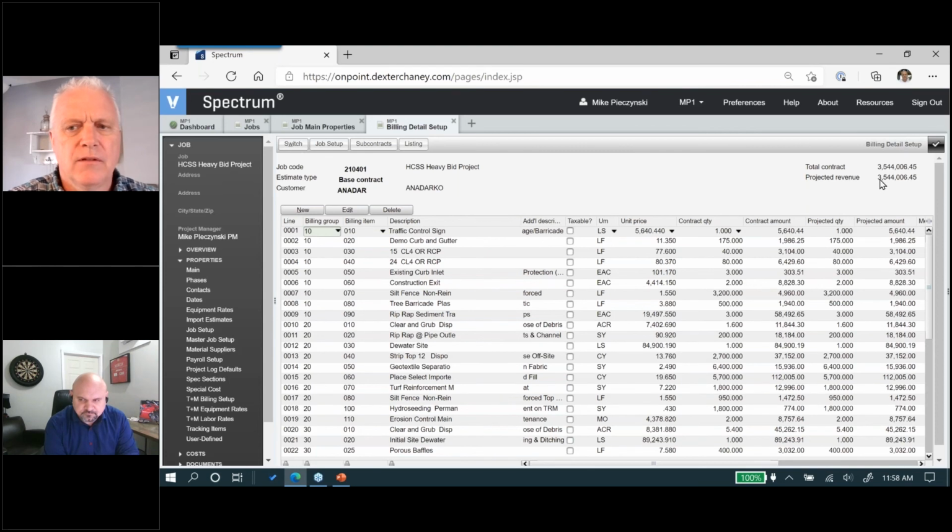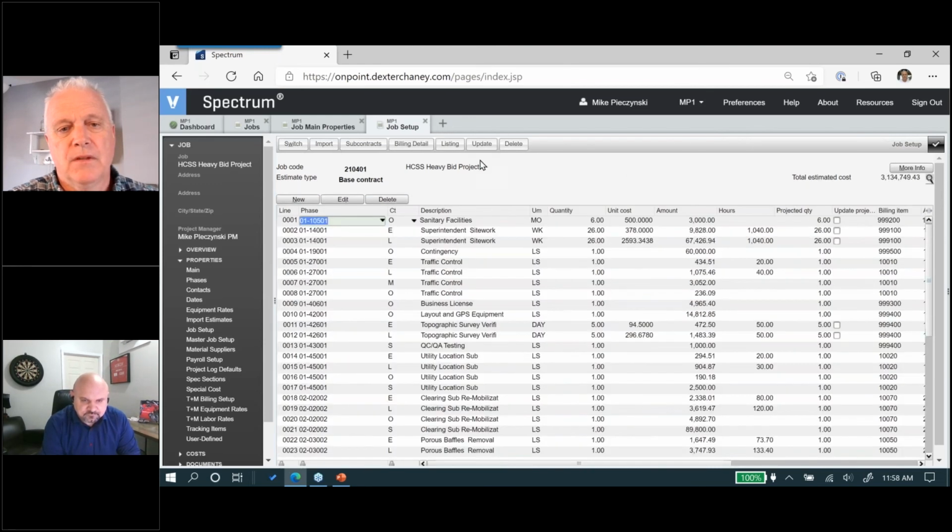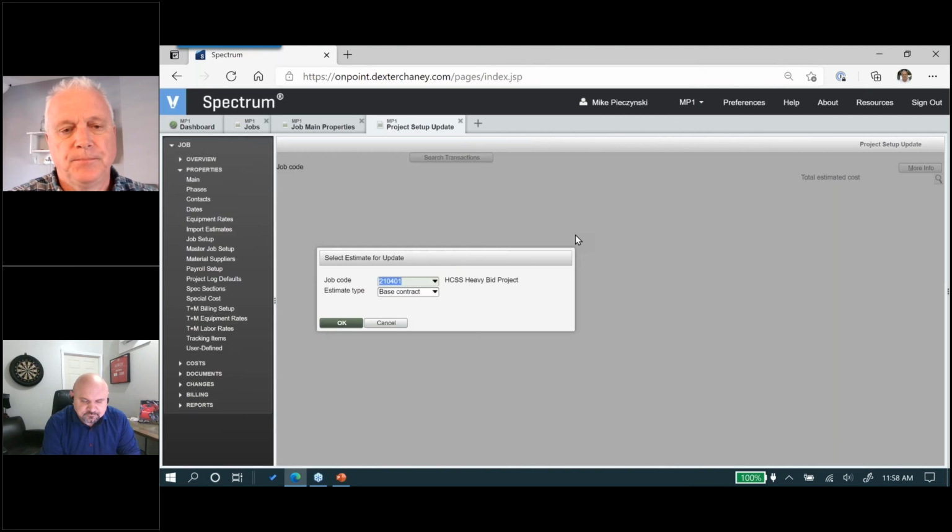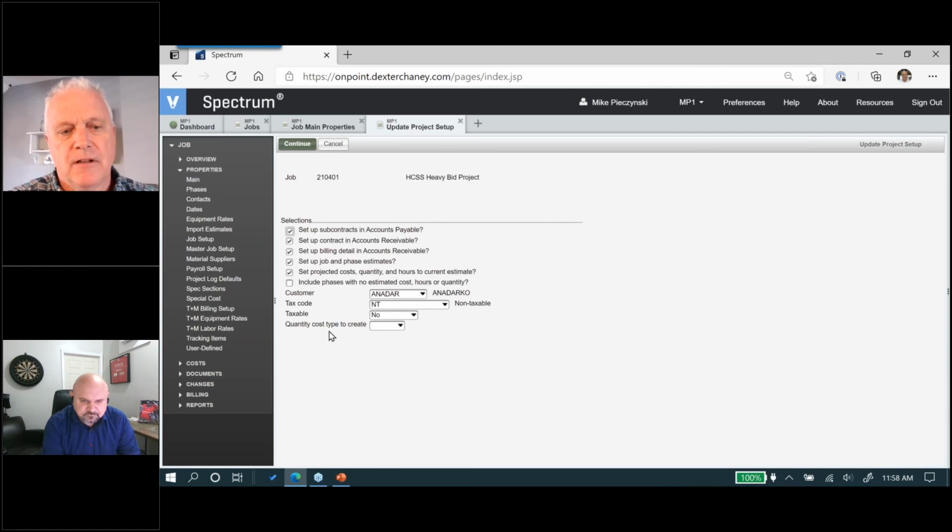My eyes come up here to the total. I'm feeling good about 3.5. I trace that back to the HCSS software. So I'm ready to update now. To do that, I'll click back on Job Setup, and I'll click on Update. Verifying it's the base contract, I'll hit OK, accept the pre-fills, and hit Continue.